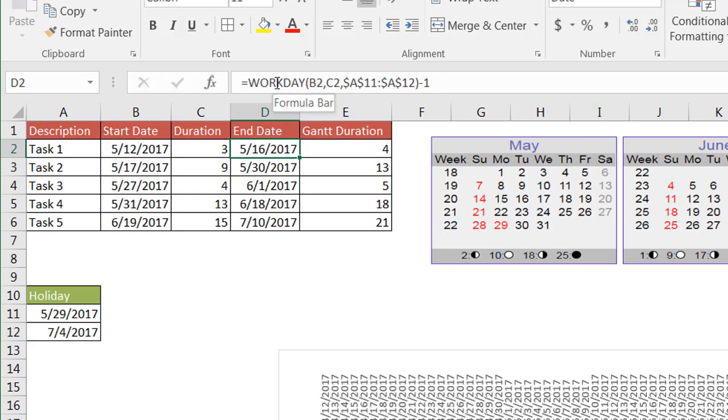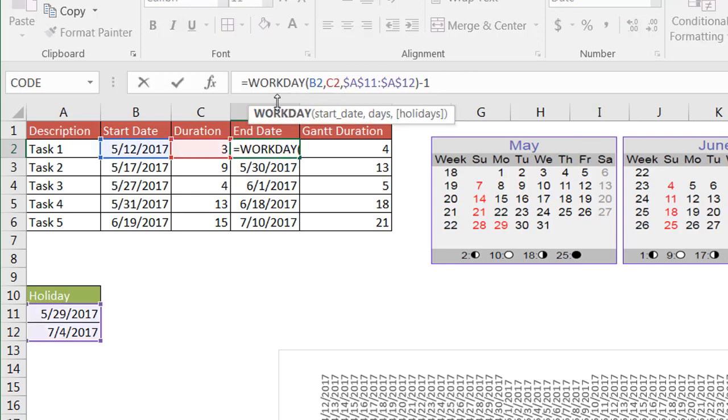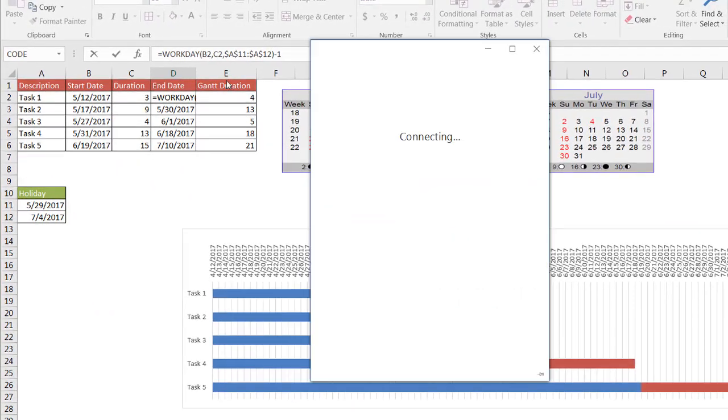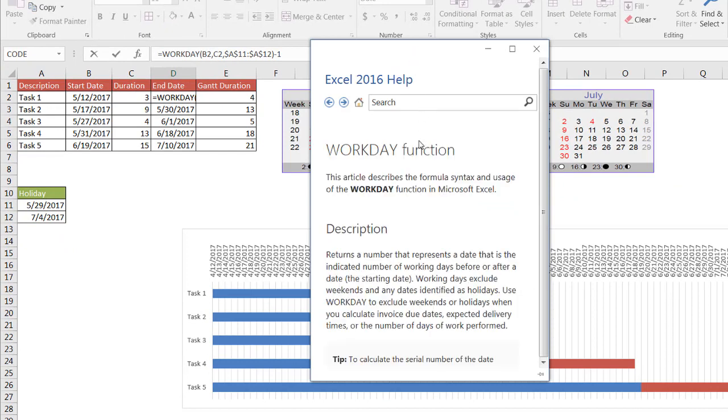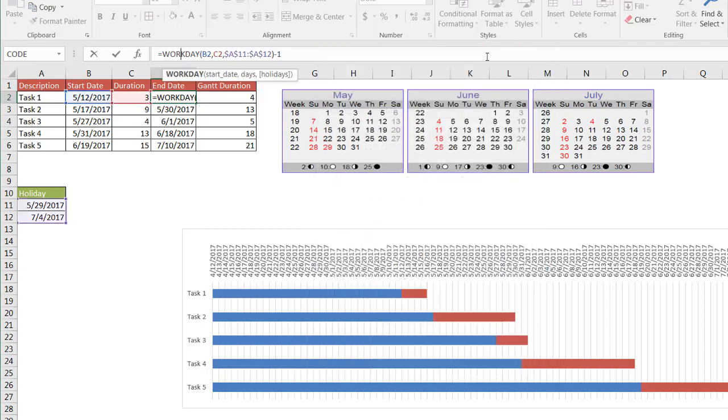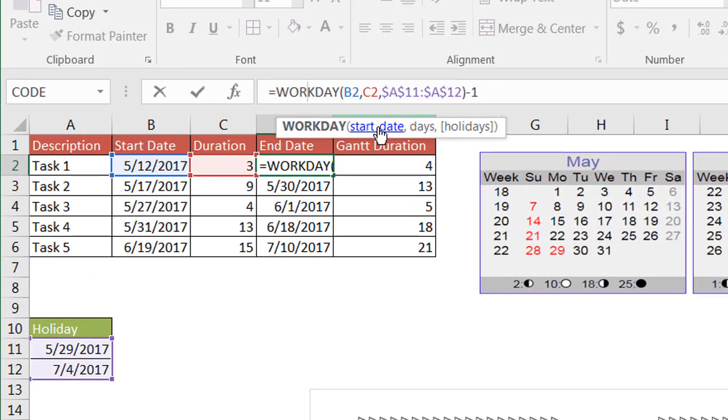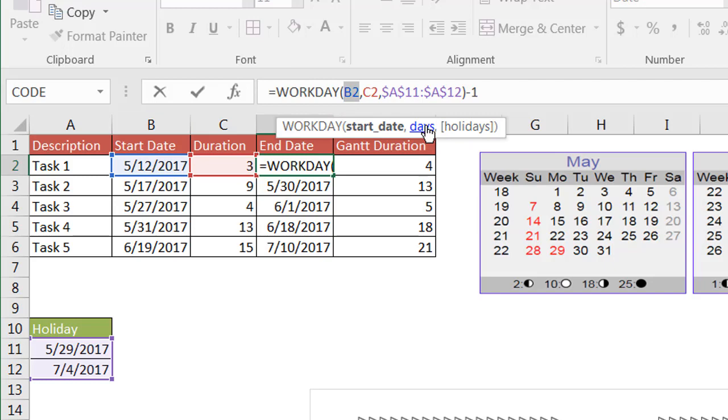Let's see how the WORKDAY function works. If I click on the formula bar here and click on WORKDAY, it's going to tell us what the function does. It returns a number that represents a date that is the indicated number of working days before or after the date, that starting date. If I look at the arguments it takes, it's going to take the start date. So in this example, in cell D2, the start date is in B2. And the number of days is the date that I enter, this duration date.